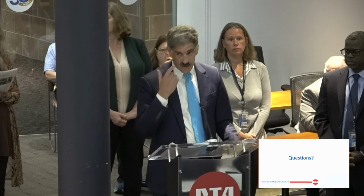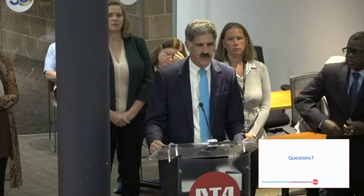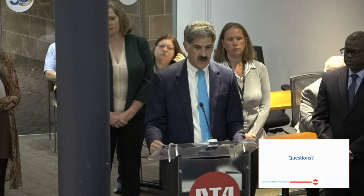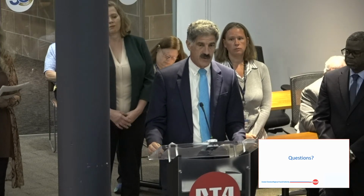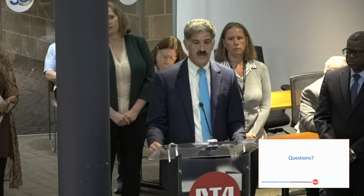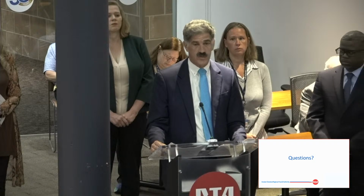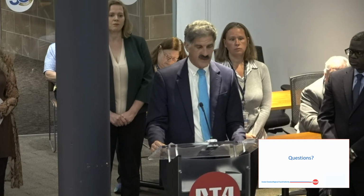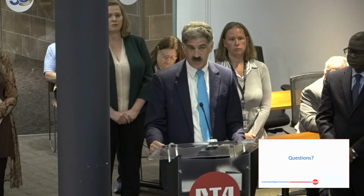On this project, fortunately, we had a $6 million budget, so the additional money is there. It's a combination of federal grants and local money. We are in discussion with FTA Region 5 on the split of that, so they're reviewing the change order also. But we do have funds identified because the project was under its $6 million budget originally.